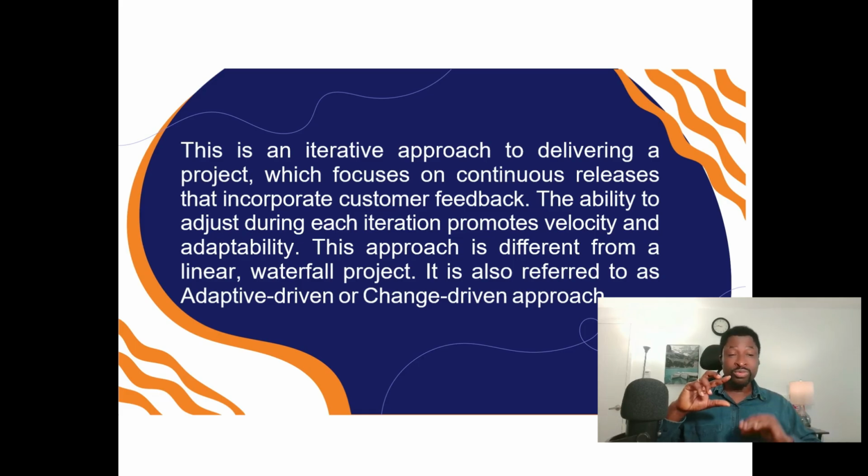In the change request form, we put the information there, and we pass it to the change control board to approve it. But under Agile, we don't have to pass through those processes. Once we have a change, we discuss with the team, and we do another planning.